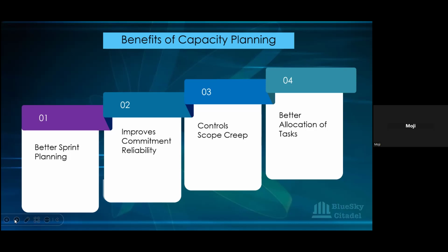We are not drowning the team by rushing them and putting them under pressure. If we have low priority work that is maybe a 5 and a 3, we can take those out in order to accommodate that 8. So we're still balancing what we can do, not just taking that in and increasing our effort. We're increasing the story point for the sprint. We'll negotiate. We'll take things out because we know the capacity. So it helps you to control that, and it also helps to better allocate tasks.